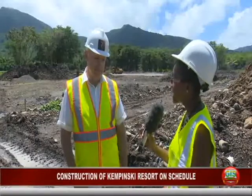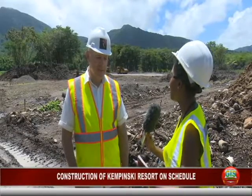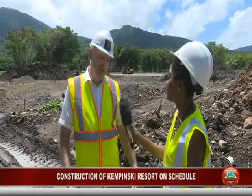We're looking at 2018 as the time for the project to be complete, but let's just talk about all the different things that may cause the project to be delayed. Well, again, we have to be realistic. We're here in the Caribbean, small islands, we're subject to all the problems with rain. There's a little bit of that in Dominica. The hurricane season, again, we've got 2 hurricane seasons to go through. That's why there's no firm commitment. We need to be realistic. We need to get the progress moved on somewhat before we're firm with what date in 2018.